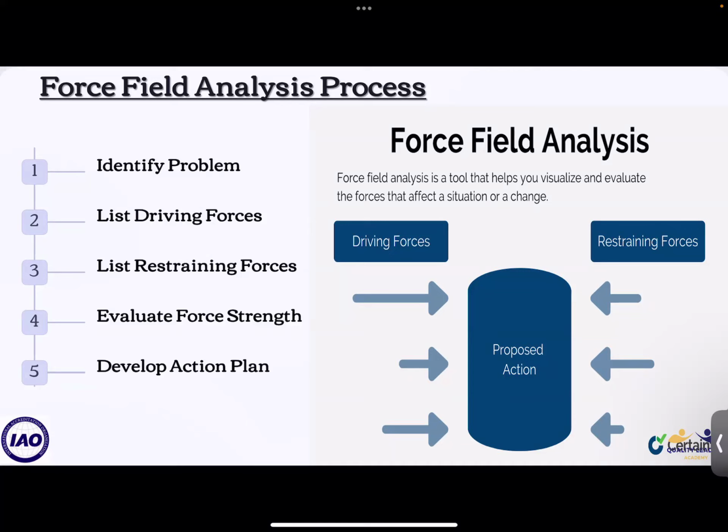So you might get a question asking, how can you evaluate the success of a project? It could give you two forces or a force field, and you have to use them. I check the driving forces. I check the restraining forces. I evaluate which force has a higher strength and impact. If the driving forces have the highest strength, it means the project is strongly driven and has momentum.